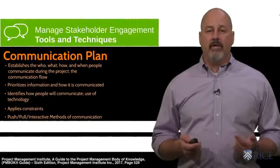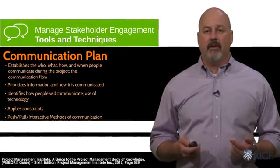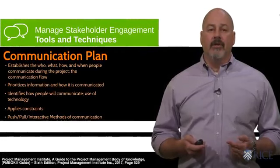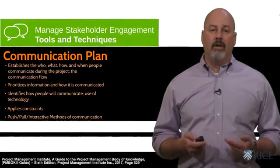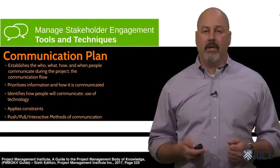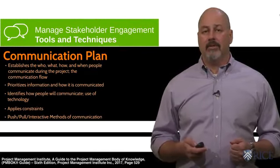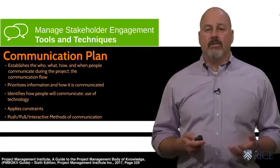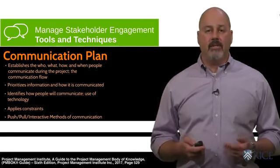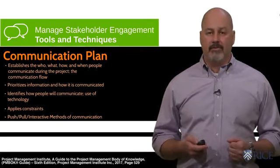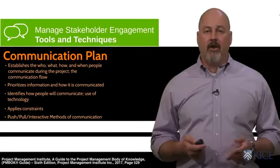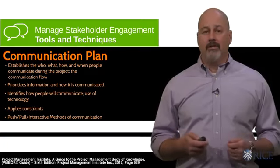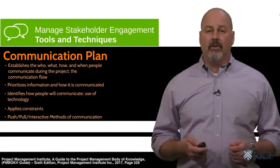Your communication management plan becomes very important at this point and should clearly articulate the who, what, how, and when of communicating to the stakeholders. It should prioritize those communications so as not to inundate stakeholders with too much information, and it should indicate the mode of communication you should use for each stakeholder.